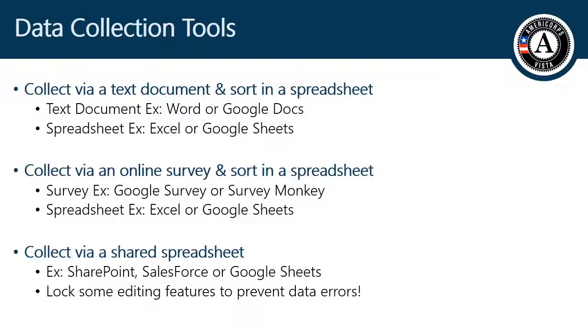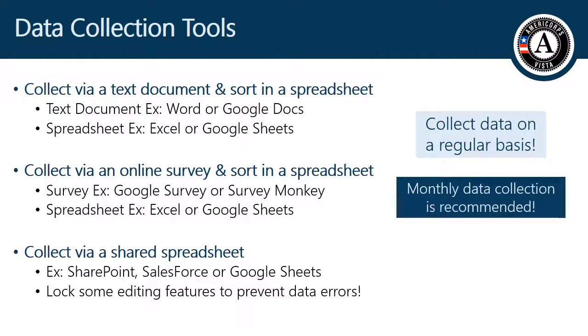Regardless of what data collection tool or method you create or your project uses, we highly recommend collecting data on a regular basis. Many projects see a high level of success with collecting data on a monthly basis from their members and subsites. Collecting data every month ensures that data and narrative experiences aren't forgotten and allows projects to tally data according to their project year for the project progress reports and to the federal fiscal year for the VISTA Progress Report supplement.